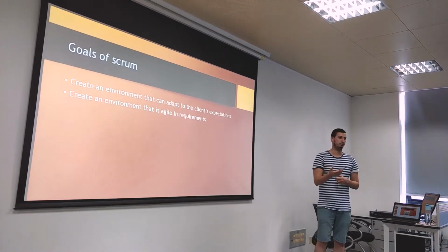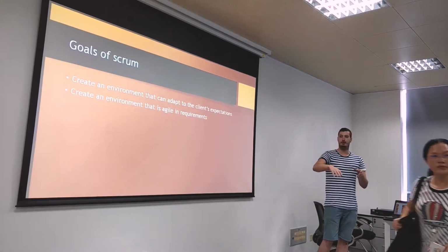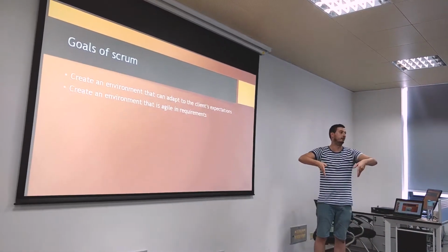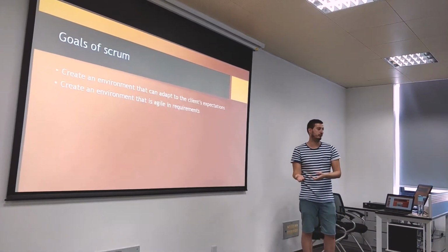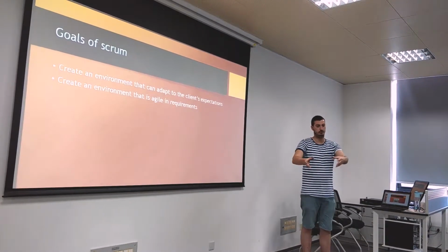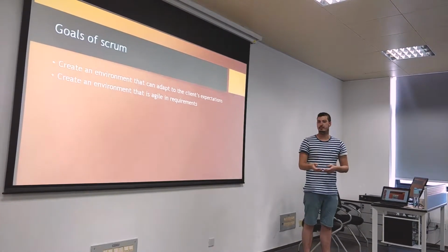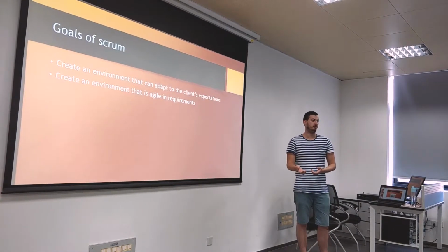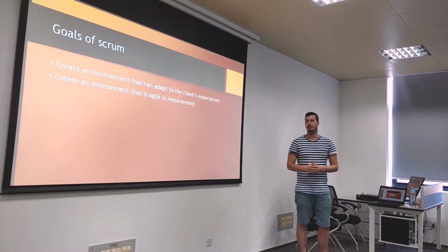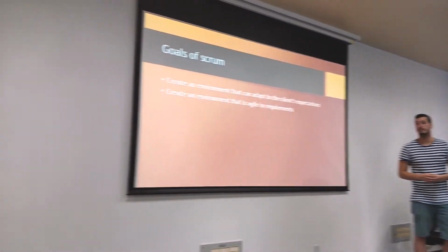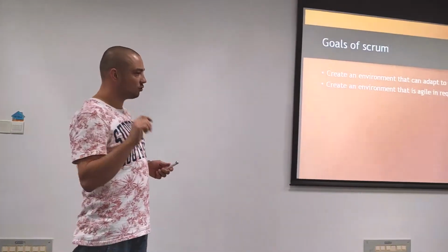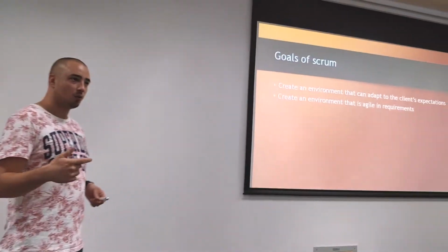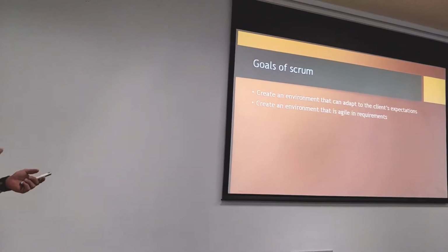Like with a car: when you build a car and you only make the doors, you can't sell it as a car. If you make the ground and the wheels, maybe a steering wheel and the engine, it's not finished, but it could drive, so it is sellable. So that's the priority of what you have to do. It's important to know, and when we do the little workshop later it will become clearer, that at the end of each sprint we need a shippable, usable product. That was it. Thank you.